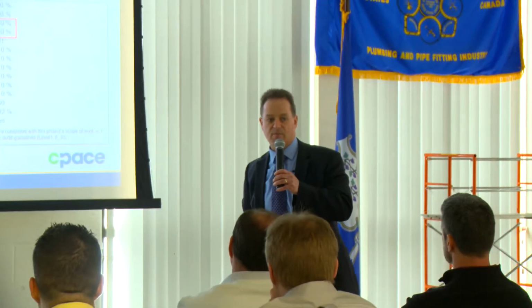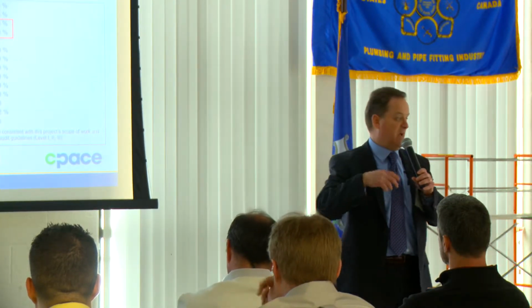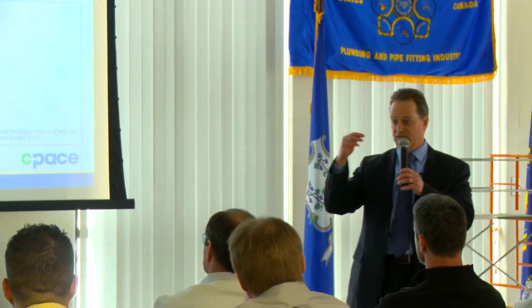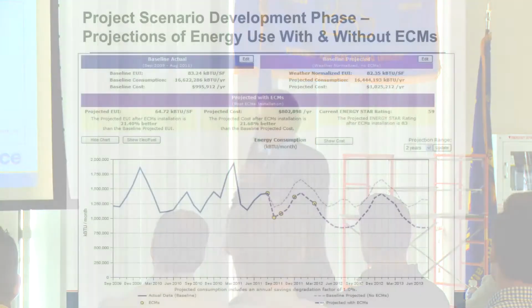Maybe if that's the case where there's a performance incentive in play, maybe you even want to prepare a separate scenario report. And again, we'll see this in a minute, how this can be done quite efficiently, but maybe you even want to prepare an incentive report that says, here's what it's going to look like if you qualify for the full incentive. Here's what it would look like if you miss your performance incentive. But just to be clear, if that's after installation, obviously the finance agreement would have to be all buttoned up, so everyone's going to have to kind of sign on for what we think the best scenario is.